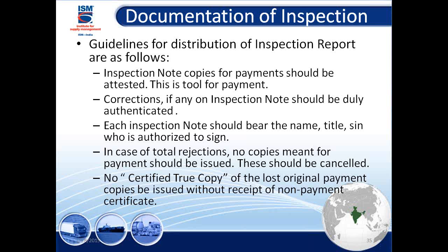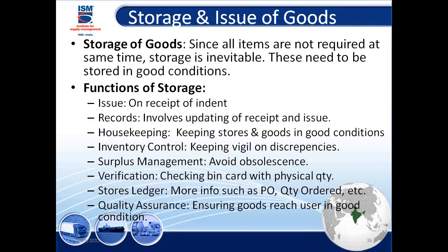And in case they have lost it, you should not give a certified true copy until you check with finance that no payment has been done. If payment is done, you can't give a certified true copy. So keep that factor in mind. So this was the inspection part.